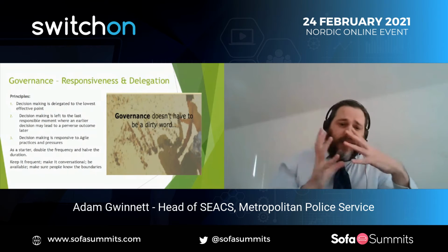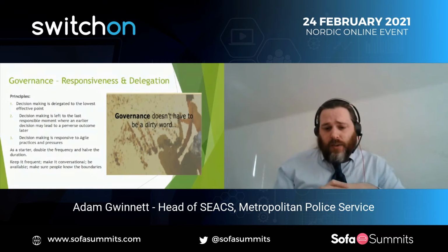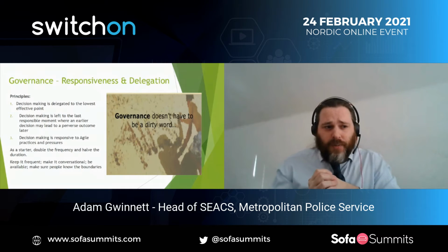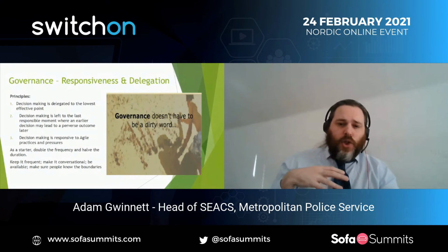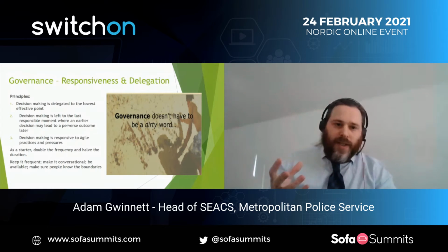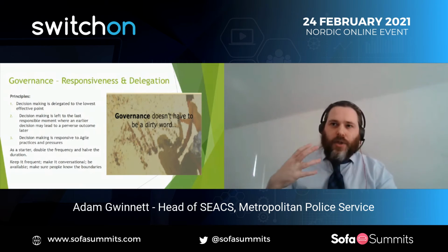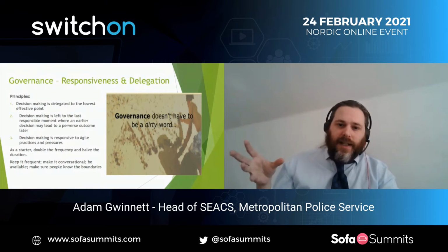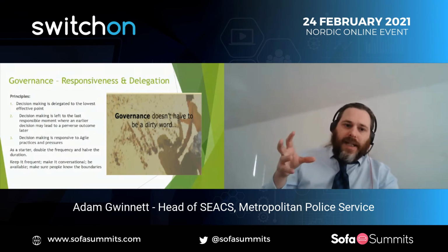Quite perversely, compared to some of the modeling that we used to do, I'm a big fan of leaving actual decisions till the last responsible moment, effectively because you're always learning, the context is always evolving, you're always getting feedback that you should respond to, and the earlier you lock in a decision, the less likely it is, I think, that the end result will be what you need it to do.